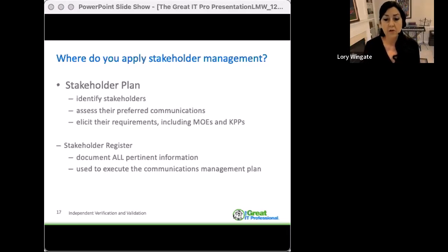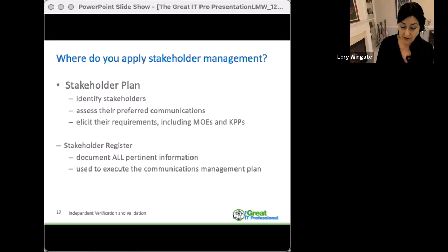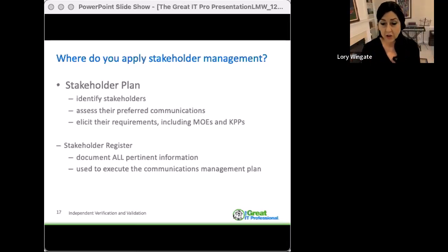For example, if you're using the standard waterfall method, you're going to probably gather your requirements at the front, and you might give updates throughout the project, but you're not really engaging your customer in your day-to-day work. Unless there's a major change that comes up, you're not really going to interact with them. On the other far end of the spectrum, if you're running an agile project, you're probably going to be engaging with your customer on a regular basis.